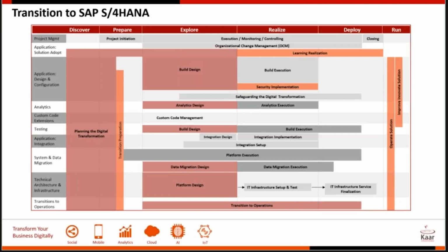What we've seen is that multiple iterations are really important. And then when you build your development system and your QA system, it is recommended that you freeze all your development, take out all the open developments so you can look at them later, and overwrite your development system with copies of production. Why would you do this? Primarily, it helps you in two ways. Once you've gone live, your development and QA systems are very close to your production system, so your support becomes a lot easier.